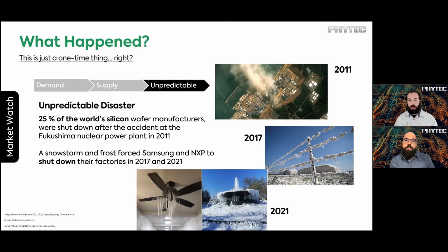I wish, but basically think about there's a clean room. Once you shut down the facility and you ramp it again, you have to reestablish the clean room. So you not only lose the 2 or 3 weeks of the shutdown, you lose more likely up to 20 weeks to really get the process going again. Of course, there are shutdowns which are planned and which have slightly less impact, but it is not always the case. As I said, all the gears need to work together to have the optimal supply chain, which is the 30 weeks. And all that product that was on the floor when you had to do an emergency shutdown, they can't just resume working on it.